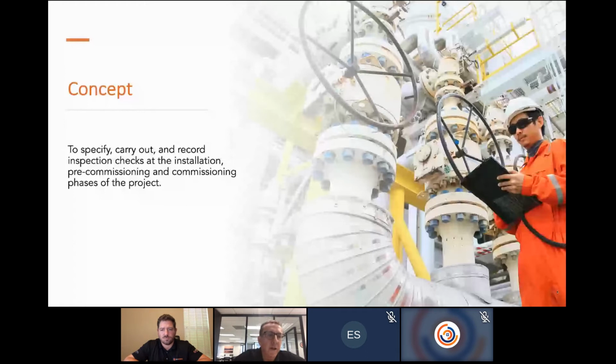Okay, good. So the concept is to specify up front. So we're not reactive, we are proactive, and we specify to our subcontractors and the internal project management team, and we carry out and then record inspection checks that are predetermined at the installation, pre-commissioning, and commissioning phases of the project. So you can imagine, on the project there's a raft of information, a raft of inspection and check sheets that we need to fill out. And without a proper management system, we all know how that goes. So that's the whole concept behind why we're doing what we're doing.